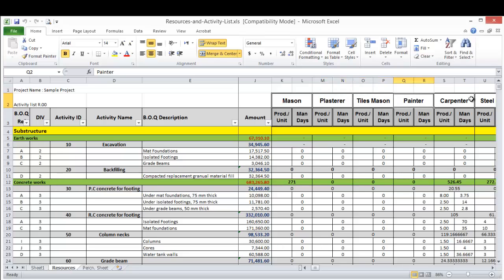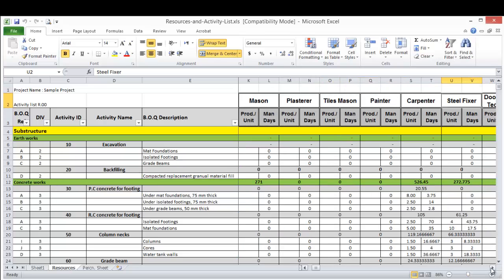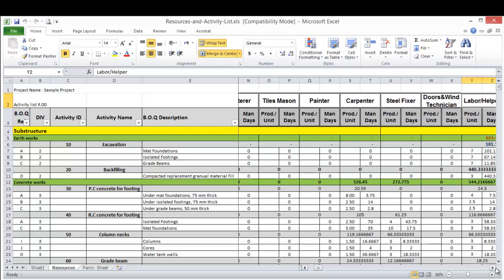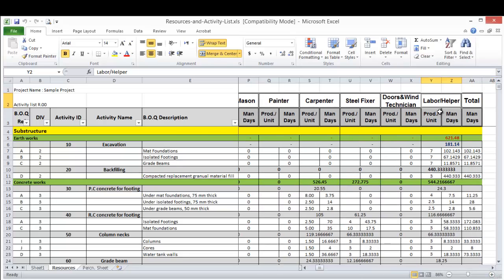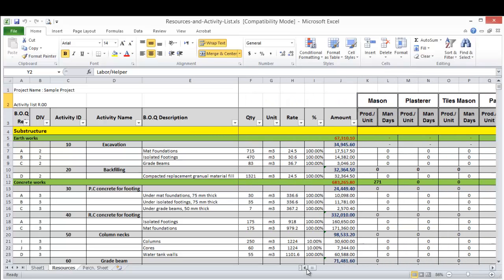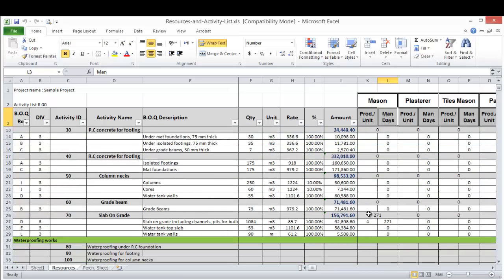I will populate in my Primavera sheet. I added simply column for each manpower, this column including the productivity and the mandates. Let's see how it works. The mason, for example, I put here a productivity of four cubic meter per day for one mason.